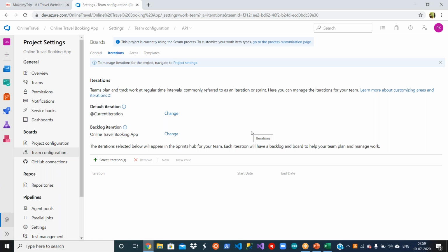In any application development, you will have a number of teams, right? As I said, testers, DB developers, programming language developers, .NET developers or Java developers, and then DevOps engineers. When you start a project, do you need all these people from day one? No, right? Because if you take all these people from day one, you are increasing the cost. So what happens when any project is started? It starts only with a project manager and basically a business analyst.